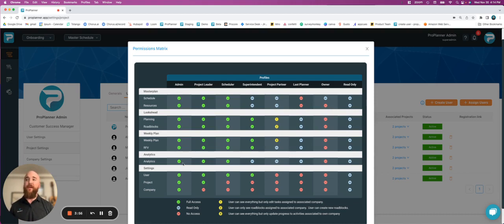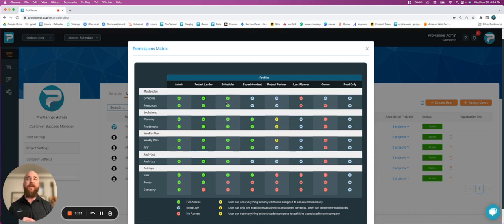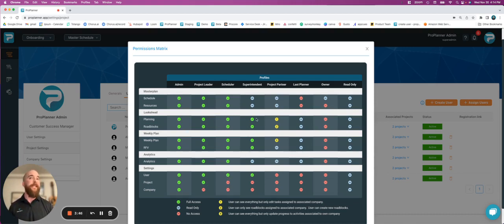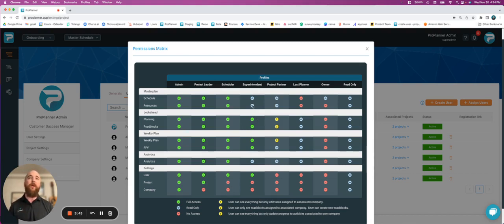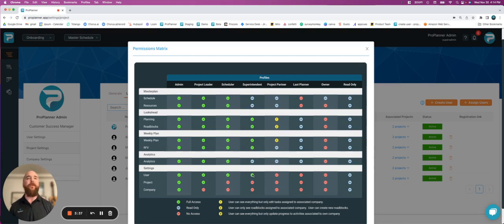You've got admins who have total access, project leaders who don't have any access to your company settings, scheduler who don't have any access to company and project settings, superintendent who has the ability to view your master schedule, but they can only make changes in the look ahead and in the weekly plan, and then they only have access to their own user settings.